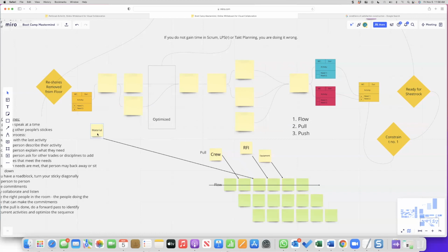Then you have that excess inventory, you have people tripping over things on site. So instead of doing that, let's actually look at it from the end backwards. When do we need it? Just in time, not too early, okay? Even if you have to order all of the materials and put them into a bonded storage facility or a supermarket or some laydown yard that's not in the way of everybody, you still want that material just in time in the area. Otherwise it's going to be logistically in the way of work.